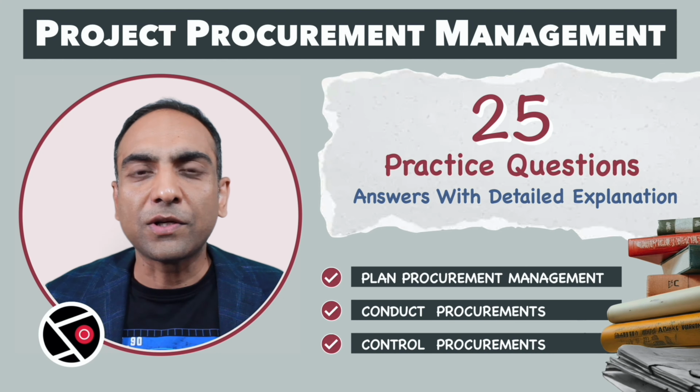This statement looks correct to me. Projects with suppliers spread across countries are likely to have a higher risk. Why is it so? It is normally easier to communicate with a supplier that is geographically closer. Distance can also create logistical issues, causing delays in deliveries. Further, laws can differ by countries. This makes contracts complex and enforcement difficult. A looks correct to me. We have to find the incorrect statement, so let's check the other options too.